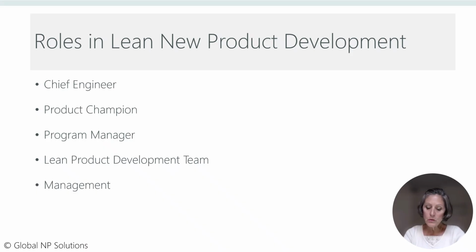Functional managers must begin clearing time for these resources as soon as the project enters the idea stage, as opposed to when the project starts billing to an internal accounting code. People need time to wrap up prior work as well as to become familiar with the new product vision and scope of work.